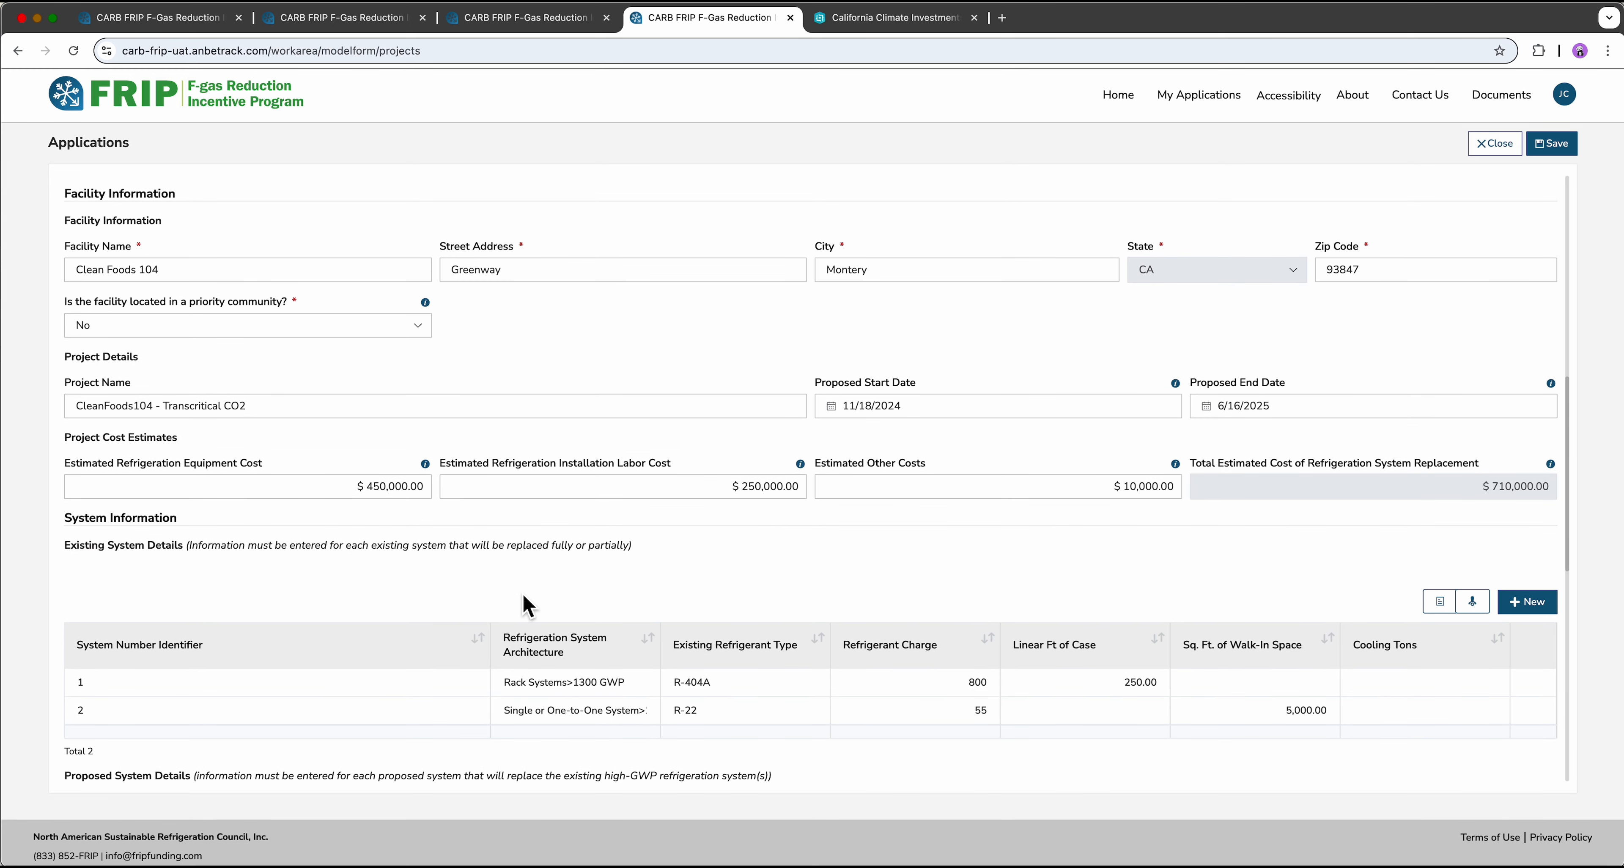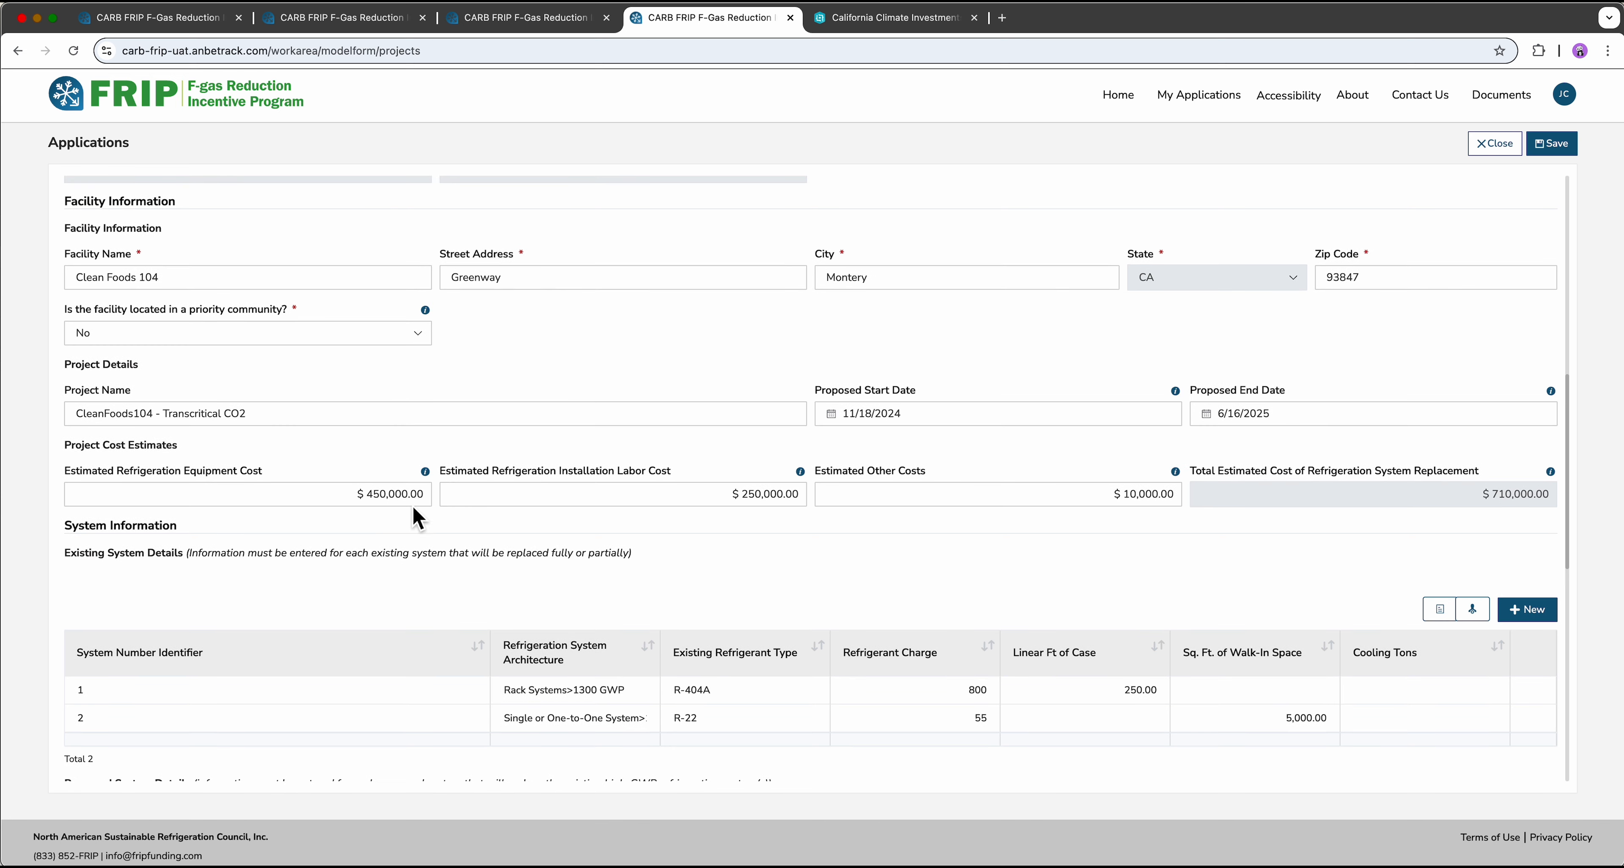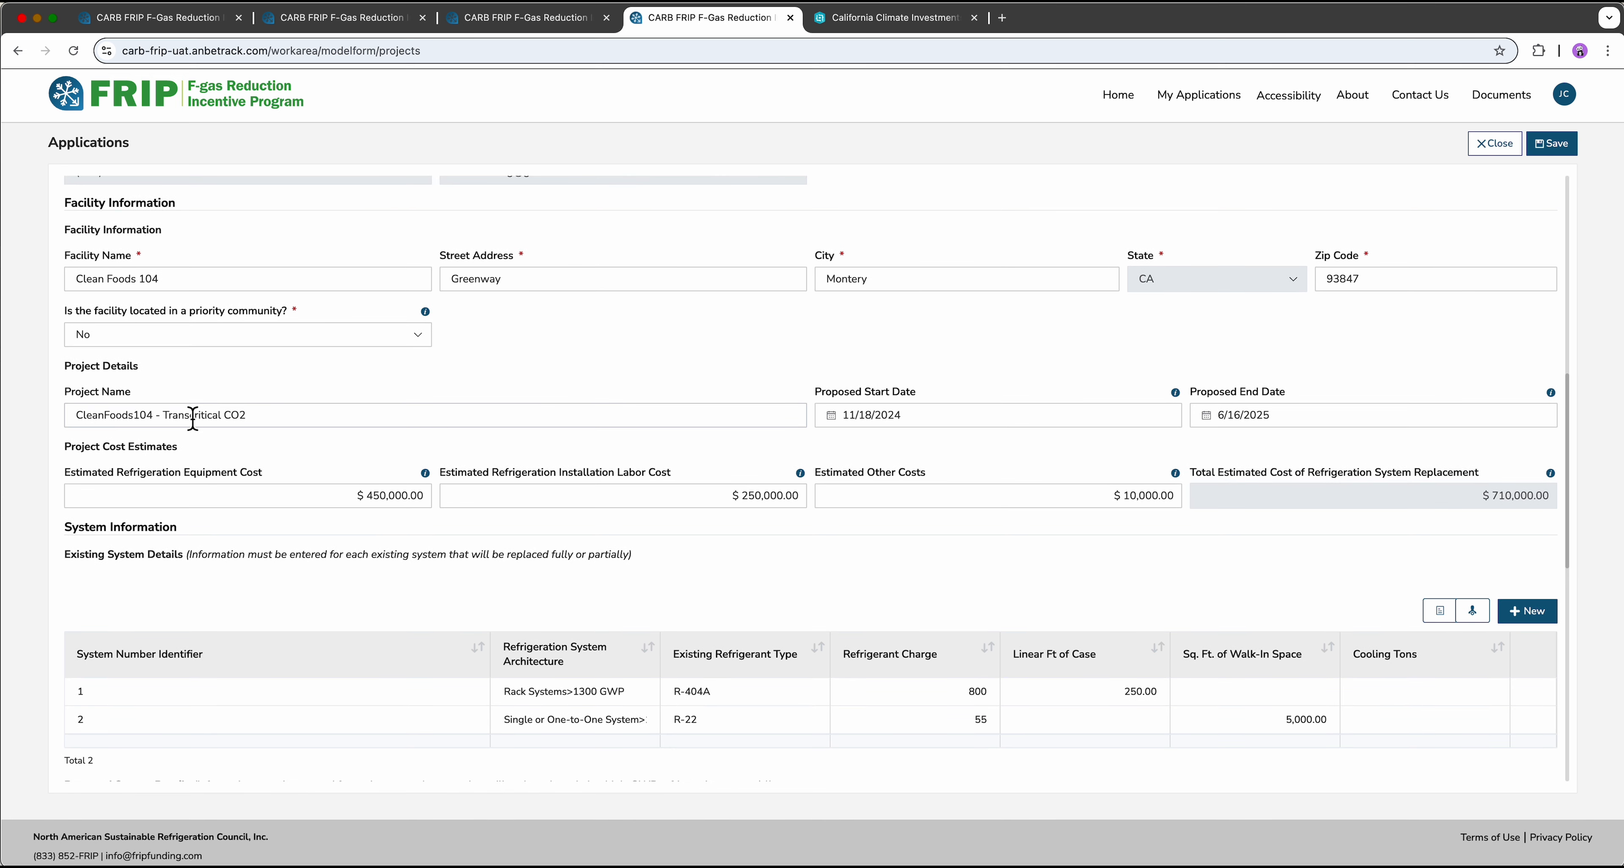Coming back to the main application, the next thing you'll add is a project name, ideally one that is descriptive of the project. I use the site name and the type of technology. Next is the start and end date of the project. To be eligible for this incentive, all projects must be completed by the end of 2026. So please make sure you will be able to meet that timeline.